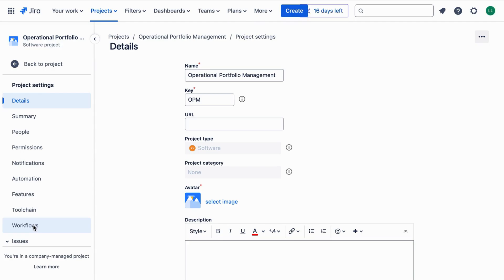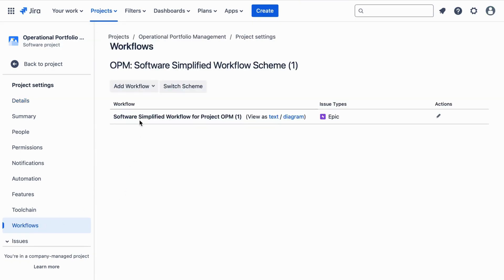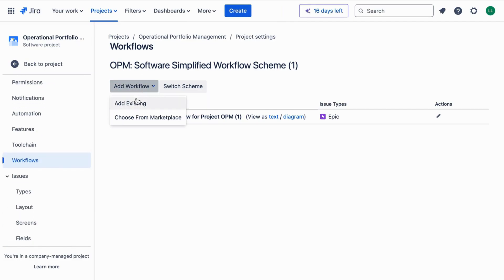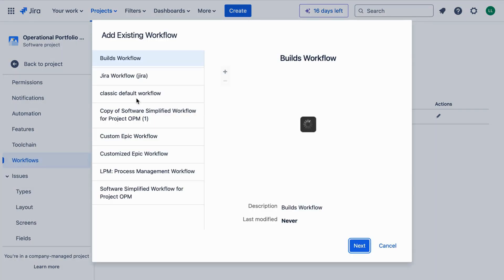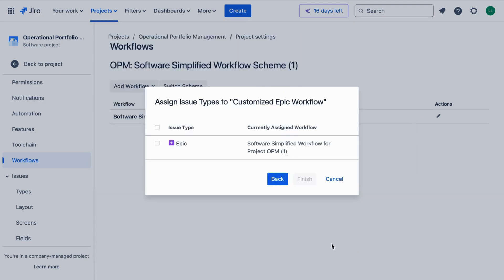Click on Publish Draft. Jira will prompt you to associate the workflow with a workflow scheme. Select 'Associate with existing scheme' and choose the scheme linked to your epics. Finally, click Publish to apply your changes.